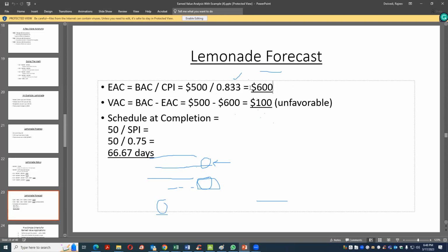So only 10 days are completed. You still have 40 days. Make sure you take corrective actions in order to speed up the process and save the cost. So within 40 days, you can minimize your losses, or you can make things within the budget. So project managers keep doing this activity on a frequent basis, weekly, daily, or monthly, as per the project size and the project requirement.